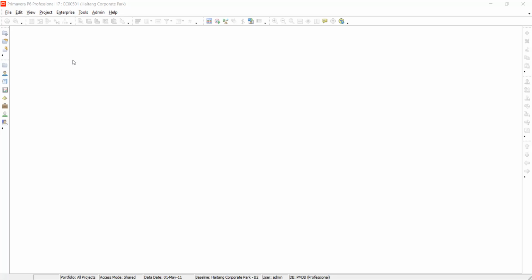Now, when it reaches the project, there is also what they call activity priority. So also as resources are being assigned and moved and ensuring that they are optimally used, they are going to first be assigned to activities that have very high priority. Then later on, the ones that have low priority can get them, because when you put the priority, it means that it is very crucial.